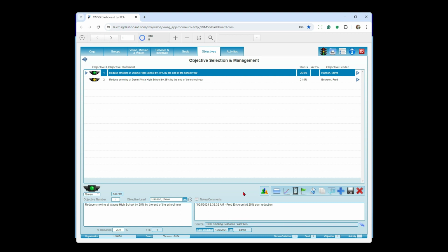That doesn't work. The reason is that from the time you save it and go to the history and update the date, it does a ton of calculations in there. It does all the measurements for the daily, weekly, monthly, quarterly, and annual totals that you saw on the drop down. It calculates the last date and the average date. So what you've got to do, if you're going to use this, is change the values, save it, go to the history record, change the date on the history record, come back here, and do the same thing again. So you've got to go back and forth. It's kind of a pain, but that's the way you have to do it to have all the data be relevant in there. Just an FYI.